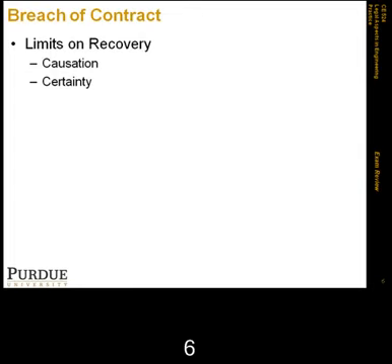You have to be exact and say that this is exactly how much we lost, and this again is governed by a measure of what we call reasonable certainty, which is based on opinion, evidence, and inferences that could be made. So we may not be able to say it exactly, but we have to come close, or estimate it with reasonable certainty.